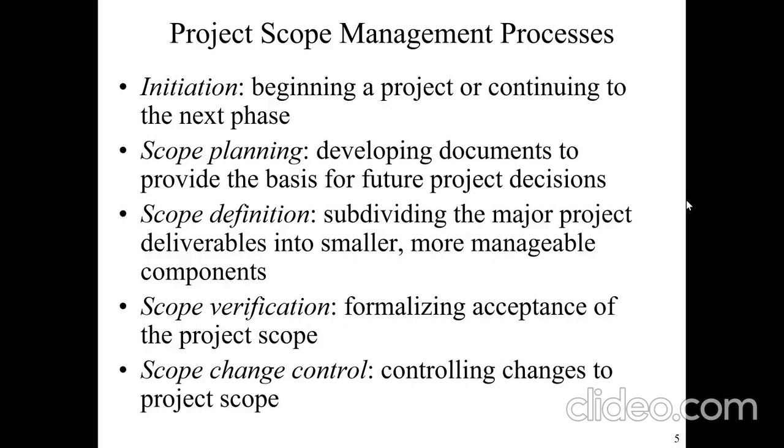So we have to break them down. We have to break website development down into small, manageable components. And then we can assign to people, okay, you do the graphics, you do the user interface, you do the database design, you do this one. So we assign them to people, and then we can get it going.